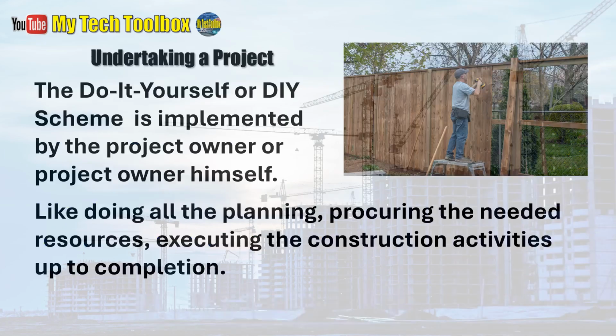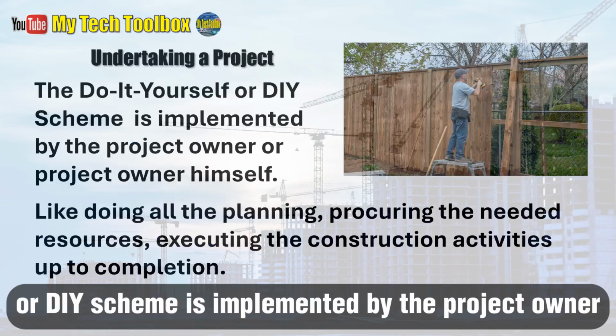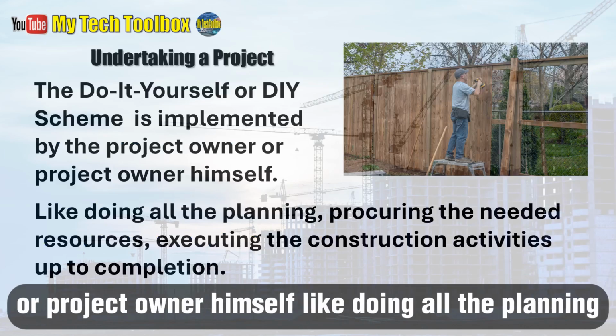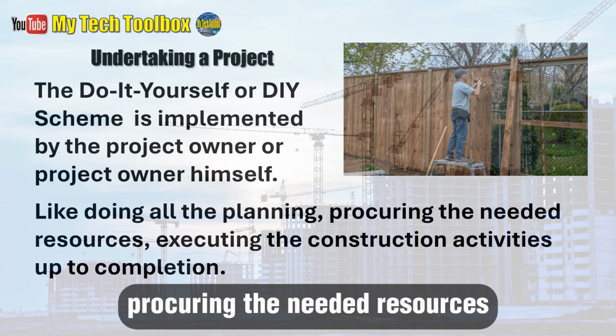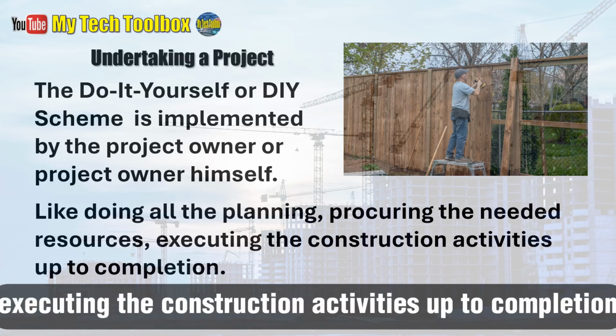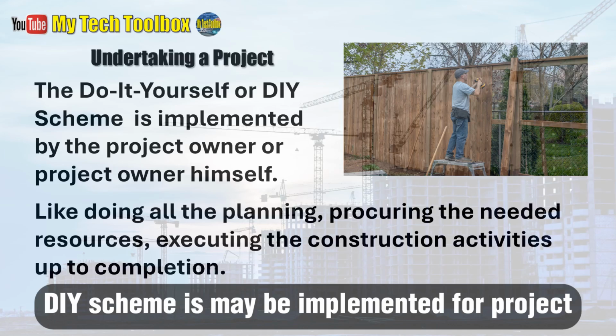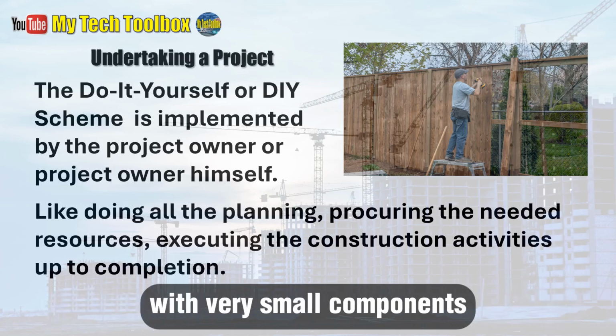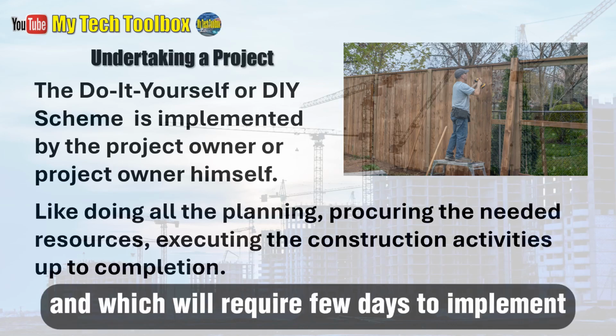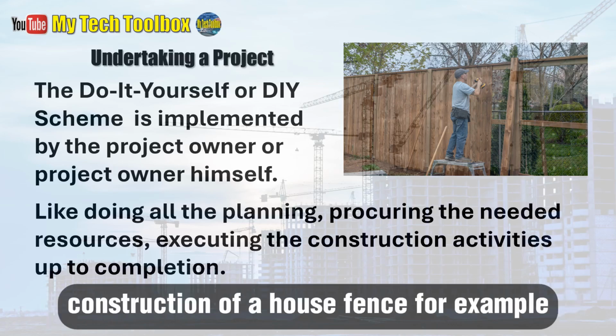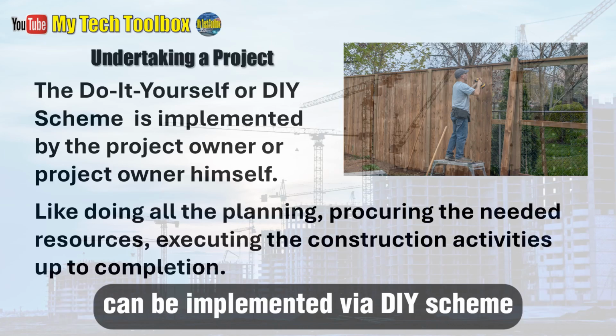The do-it-yourself or DIY scheme is implemented by the project owner himself, doing all the planning, procuring the needed resources, and executing the construction activities up to completion. The DIY scheme may be implemented for projects with very small components which will require few days to implement. Construction of a house fence, for example, can be implemented via the DIY scheme.